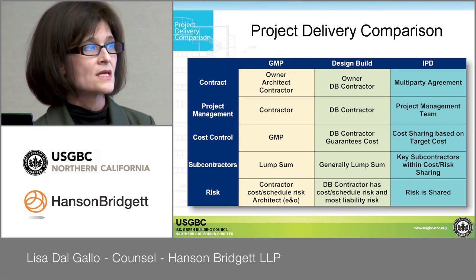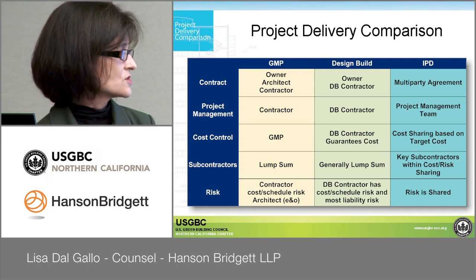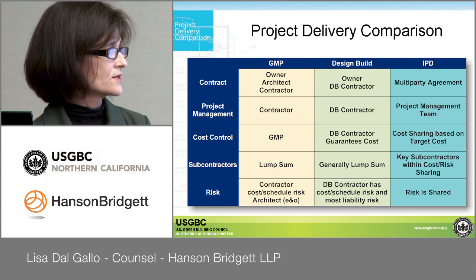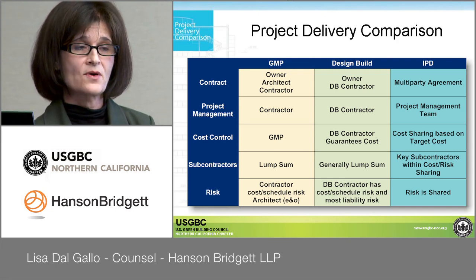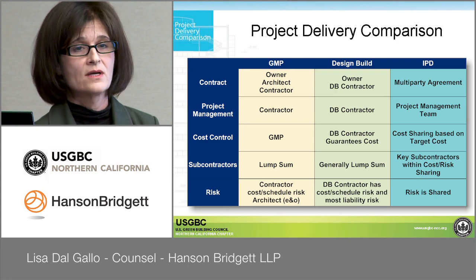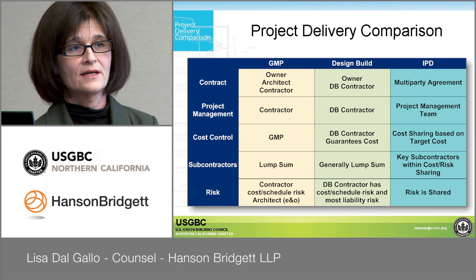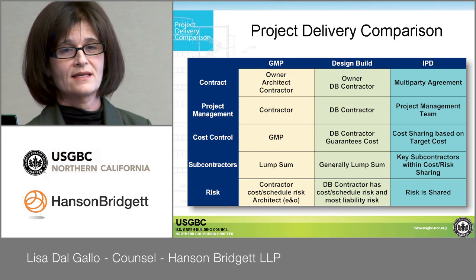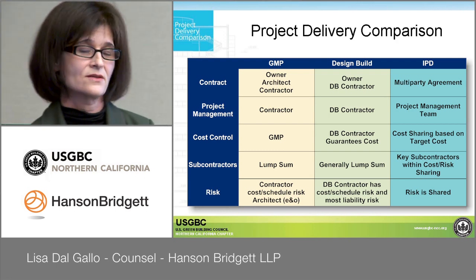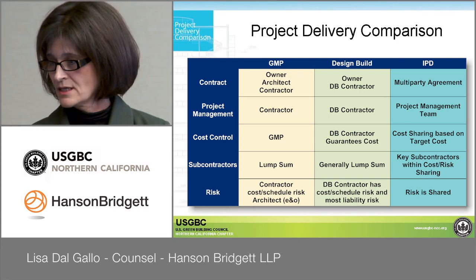from the beginning. The other big distinction is your key subcontractors are brought in early on an IPD project, and they are usually also part of the shared risk and incentive. Under the Hanson Bridgett model, that's definitely the case, and we'll talk about some of the distinctions in the other agreements when I get to that section.